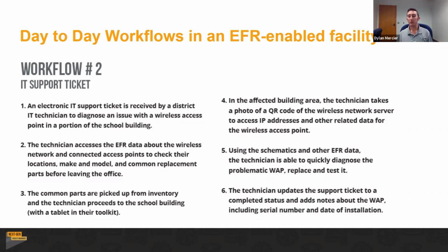You can also record the date that the new piece of equipment was installed. We all know that for some of these pieces of equipment, the warranty does not start until it's installed, commissioned, and used. So sometimes that date of installation is as important or more important than the date of purchase.